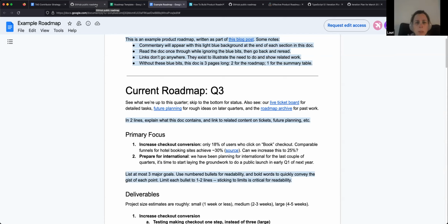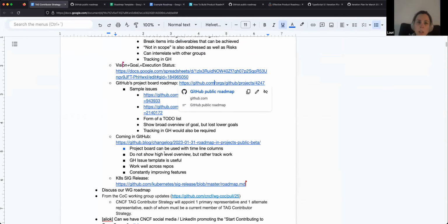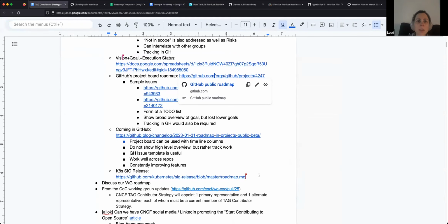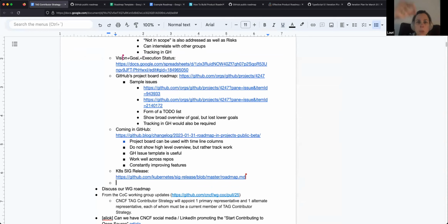I mean, one way to strike a compromise would be to put the colorful visual version at the top of a more detailed roadmap like this. And then I might make this kind of roadmap a little bit shorter. I don't think that they should be longer than a page and a half, 2 pages printed out, because people just get overwhelmed. But yeah, you could put the visual right front and center at the top, and then have a read more, and then have more details for the text. The longer version should map to what's in the visual, so everything makes sense to the contributors.